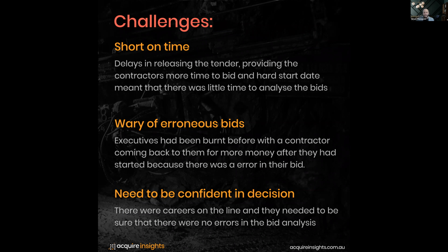They were really wary of erroneous bids. Some of the mining executives had been burnt before, with a contractor who had won a tender, mobilized, and then come back after a couple of months and said, oh, actually, we've just realized there was an error in our bid, which meant our bid was underquoted and we need to increase our prices significantly.